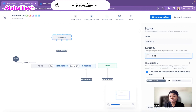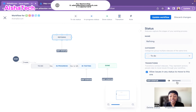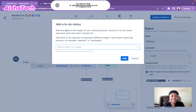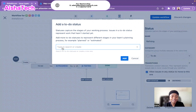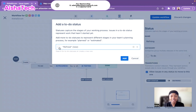Now with transitions, I have to choose what kind of transition I want for the Refining status. Should tickets go from Refining, skip all middle statuses, and go directly to done? Or should I restrict the transition so that before a refinement ticket can go to in-progress, it must first go through Refined? To do that, I'll add another status called 'Refined' — I click the plus sign and hit Add.